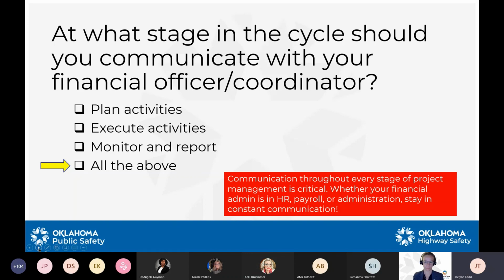One thing I wanted to say was if you are working more hours than your grant projects each month, just be wary of that. You absolutely can request more funds through the year, but that doesn't always mean that it will be approved. We really like to see the funds that we award last through the year if that's what your grant is requesting of you. So do your best to stretch those funds out. If you have people constantly requesting more hours than you've allocated for the month, communicate that with your program manager and we can look into whether there's additional funding available to fund more hours, say, in the last part of the year.